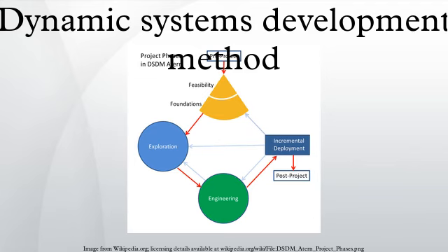Next to time boxing and prioritizing of requirements, DSDM also provides an iterative and incremental approach to development. This can be seen in the figure depicting the process overview above. The functional model iteration, design and build iteration and implementation stages can go over their sub-stages several times before entering the next stage. Each iteration addresses a set of new functionalities, and every iteration builds on a working predecessor. Each iteration can be undone if needed.